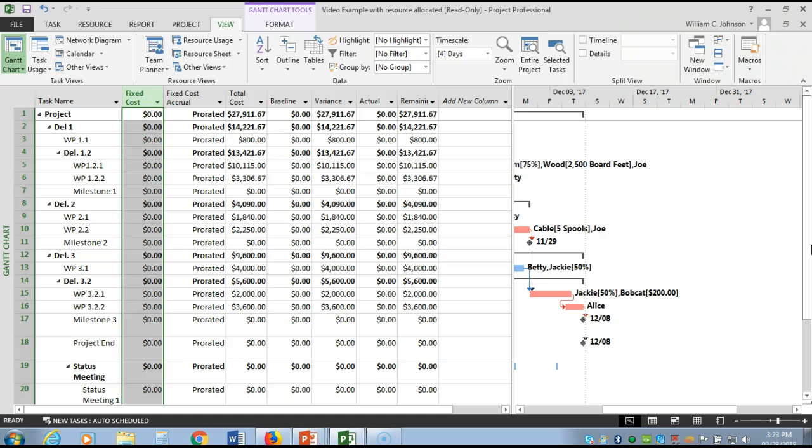column. You can add a fixed cost to your project. For example, say there is insurance that your company has paid, liability insurance for a series of projects that they are doing. The company will probably then prorate out how much of those premiums that they are paying will be assessed against your project. This is where this fixed cost comes into play.